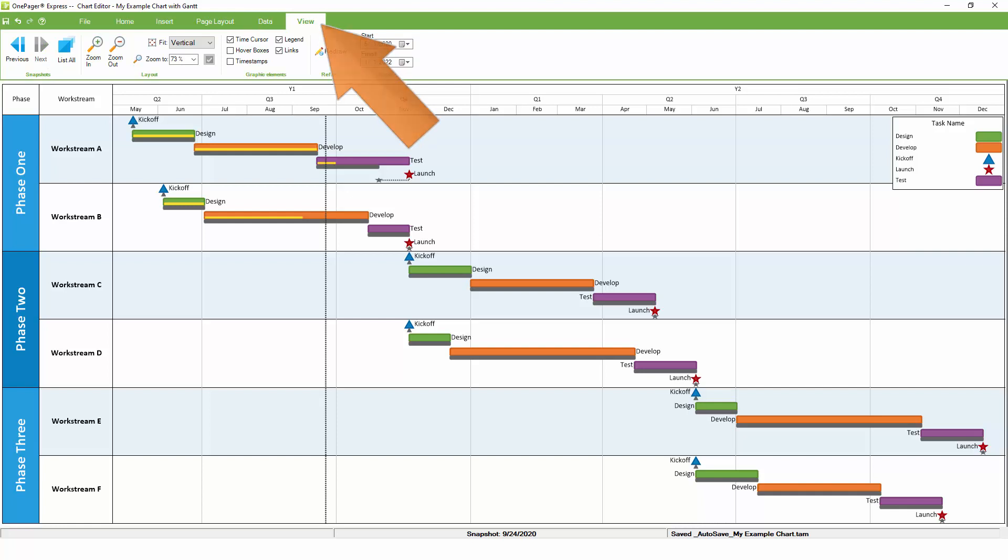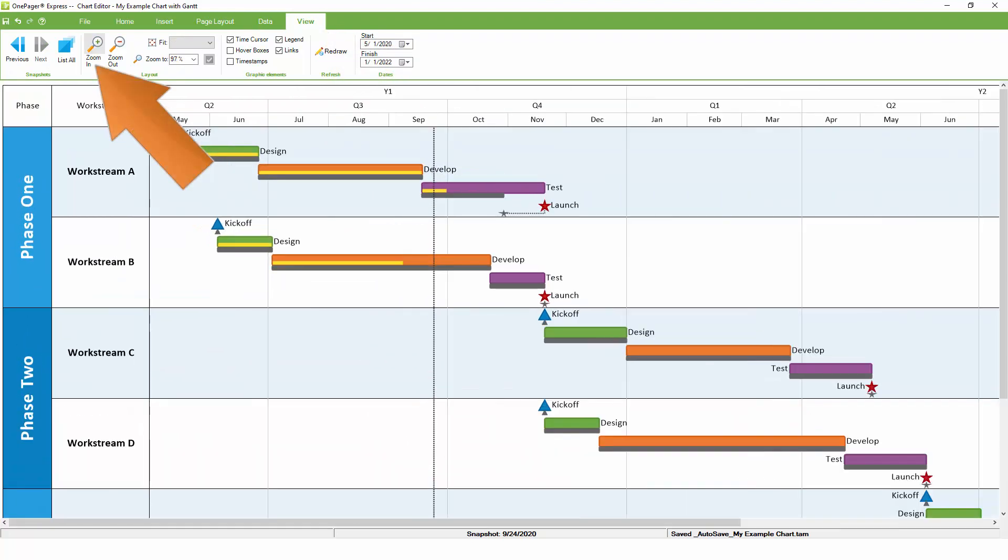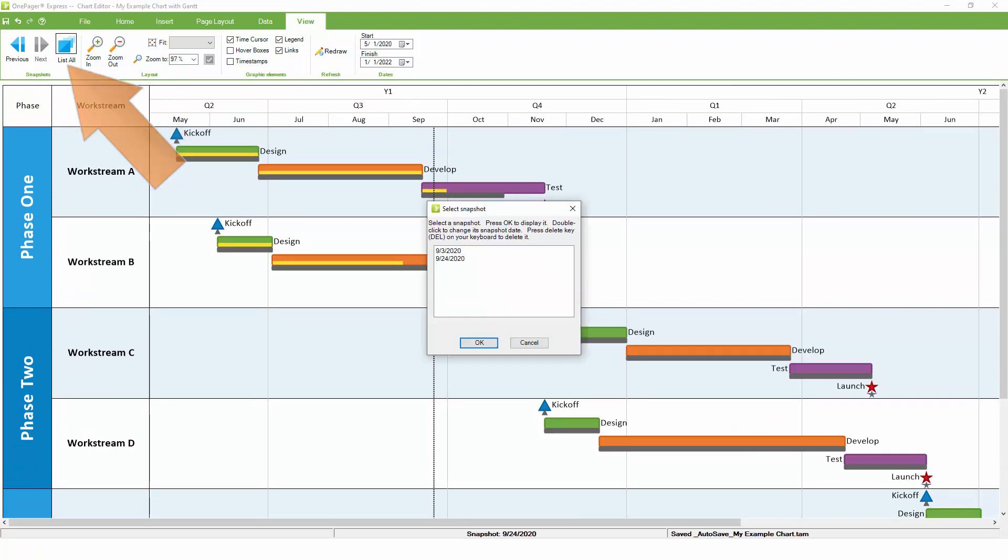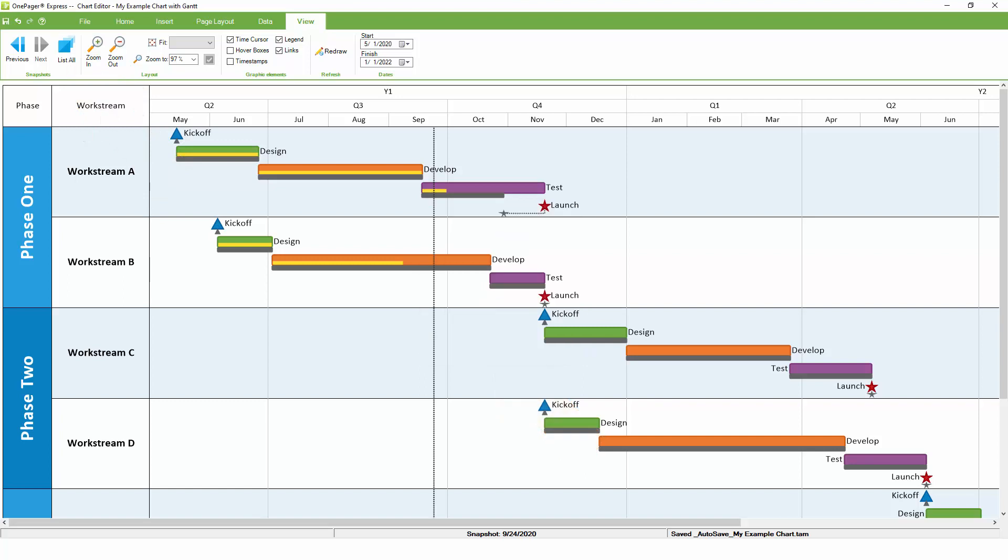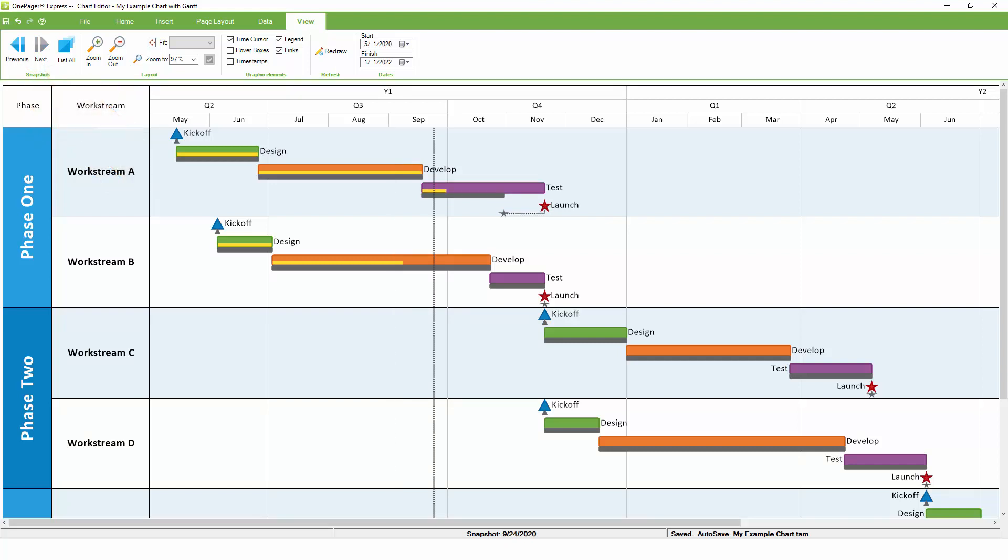If we go to the view tab, we can zoom in a little bit and see the changes that OnePager just made. We can also see a list of available snapshots. We can use the previous and next buttons to navigate between the snapshots to visualize how the project has changed between the two updates.